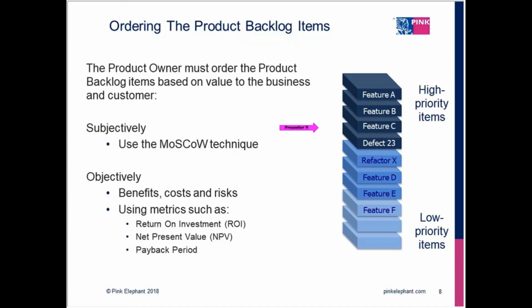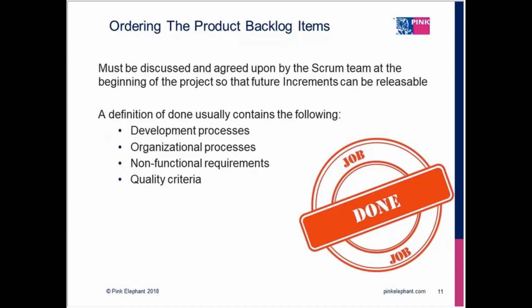And another question, do you have to get agreement on done for each slice? Yes, you do. And generally speaking, each of these features in a cohesive product need the same definition of done. You can't have high quality for that feature and low quality for this feature, because then your product's going to be unstable. So the concept with the definition of done, one product, one definition of done. These are all the checks and balances and things we do to keep the product in consistent quality. Again, you can't shortcut in one area, then make changes in the other.